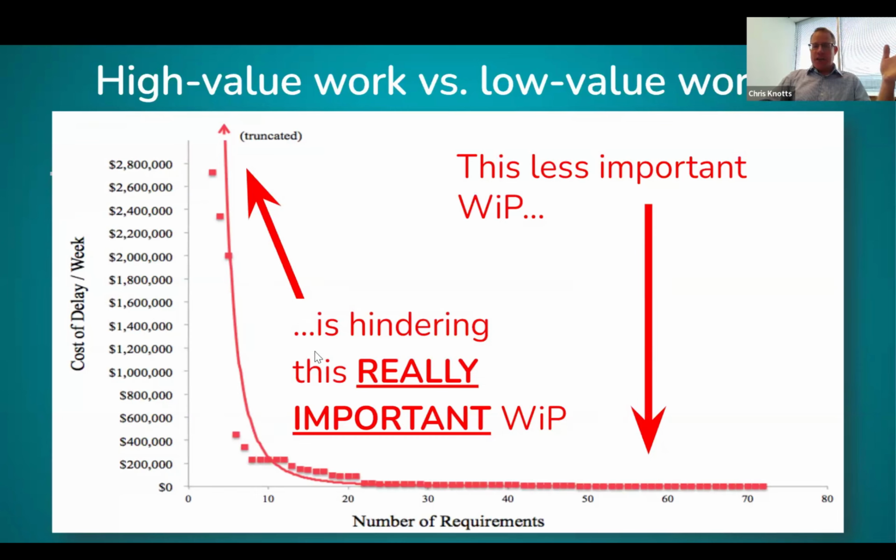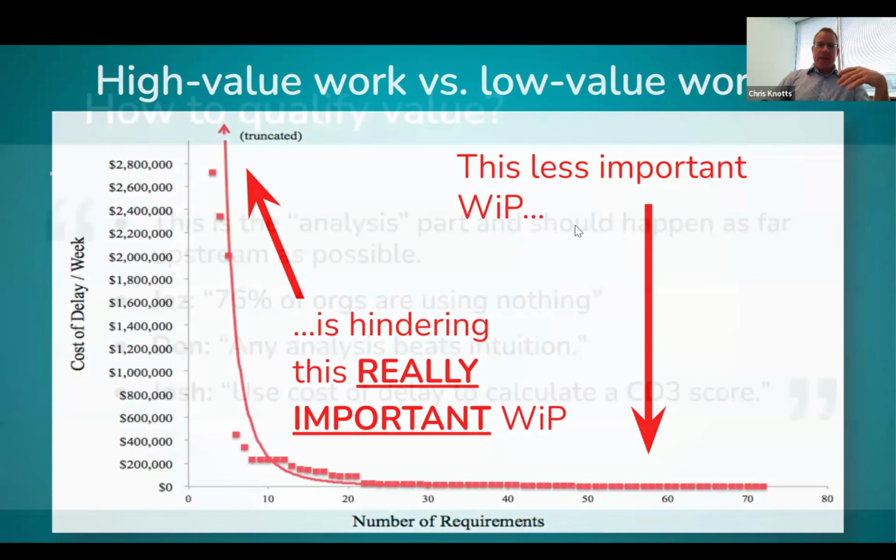But the backlog was not prioritized that way. You often prioritize just first in, first out. That's a common queuing method. It's just whoever asked for it first, they got in line, they queued up, and they're the first ones to get worked on. Well, that means you can have a long tail of lower value features all mixed up together with the really high value features. So what they did was they reorganized the backlog. It's just one example of how they did that.